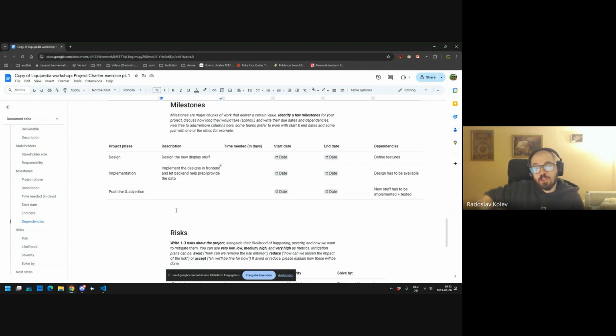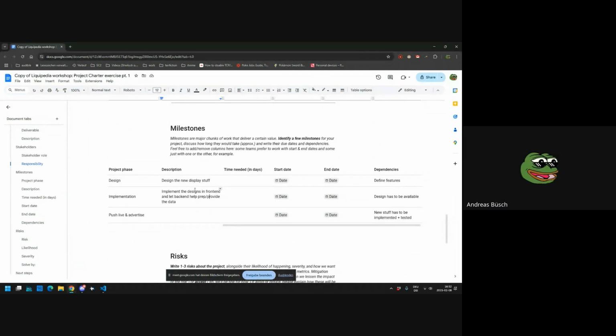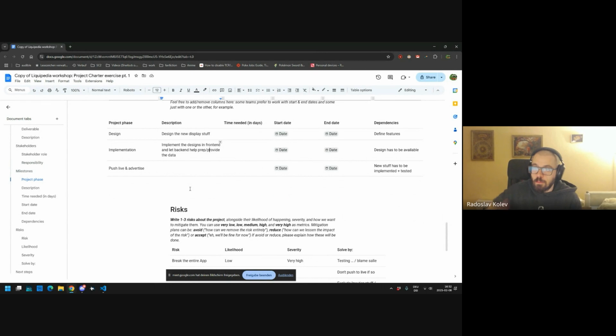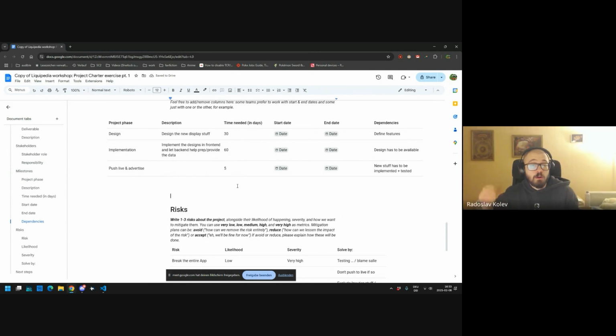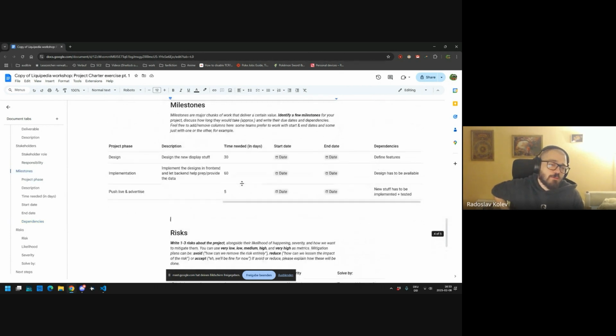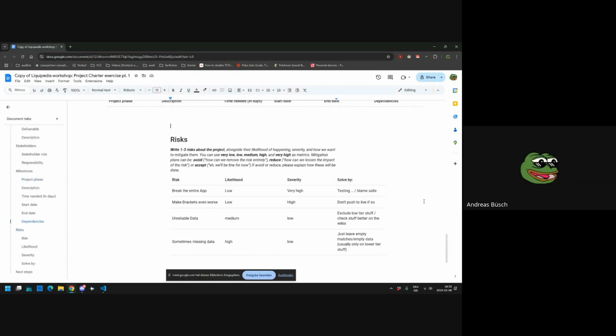Sure. Then I can start asking you, how long do you think design and implementation will take? Just give me a number. I'm really bad at judging how long such stuff would take. Make something up. Again, I'm not asking for a correct answer, and this is not a real exercise. Okay, 30 days to design and 60 days to implement. And then 1 day to push live. Yeah, fair, including advertisements. It's pretty long, 60 days of implementation, but never mind. Maybe you have a team of new developers that you just hired and they're not familiar with the code. Yep, fair enough. Okay, what are the risks?